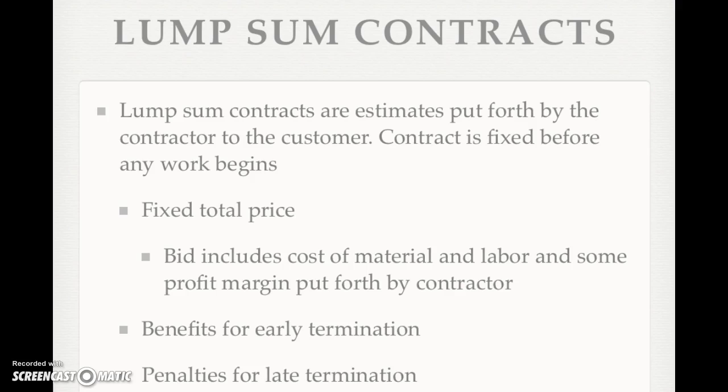Oftentimes, there are benefits for early termination when they get the complete project done, or also phases within that project done ahead of schedule. A lot of times there are penalties if the project is completed behind schedule, and those come in the form of liquidated damages, and I'll talk to you more about those in a later slide.